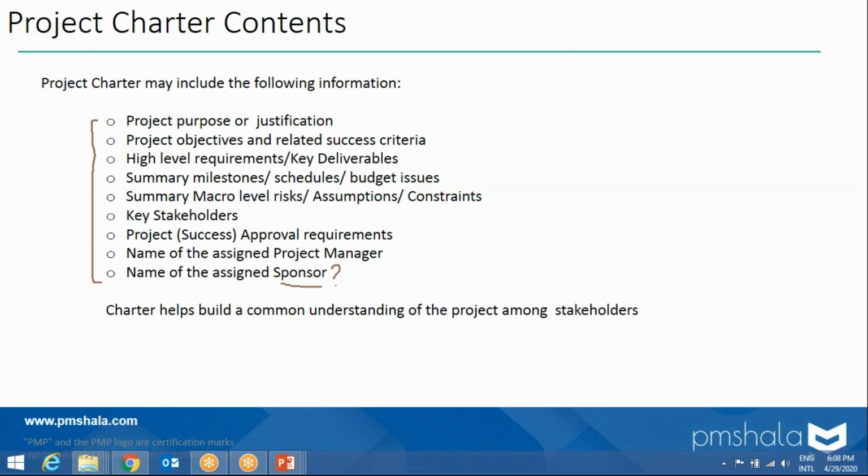Now, the sponsor would not come down to the day-to-day management of the project. That the project manager does. The sponsor is available for high-level things. Now think about this. If the project forms a part of a program or a portfolio, then please note the program manager or portfolio manager can well act as the sponsor of the project. By default, the program manager becomes the sponsor.